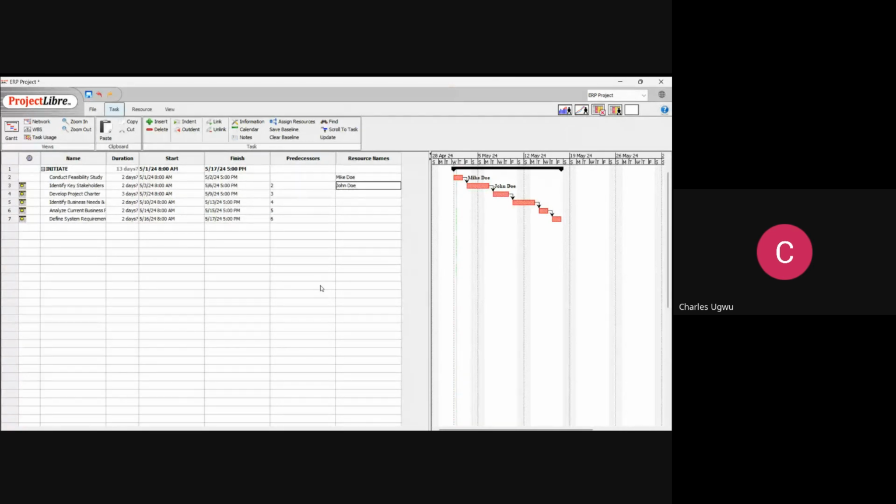And you, the developer or a business analyst, you don't have access to this project plan. So it's the project manager that is monitoring the activity, knowing that Mike needs to finish his work for John to start. And when Mike is delaying his job, it's going to affect John's job as well, looking at this project plan. So with this, you can see when activity is being delayed.